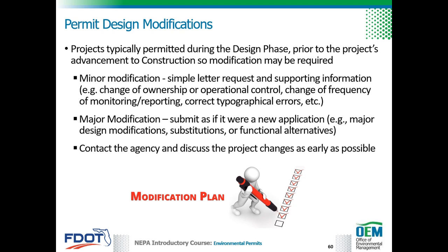Depending on the level of deviation from the issued permits, the changes can be handled with a simple letter request and supporting information for such a minor modification, or by submitting a revised project information as if it were a new application, such as a major modification.